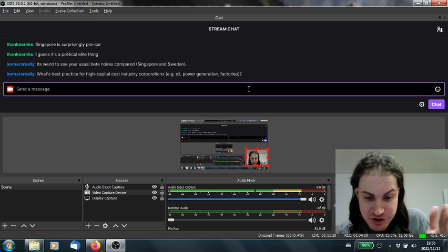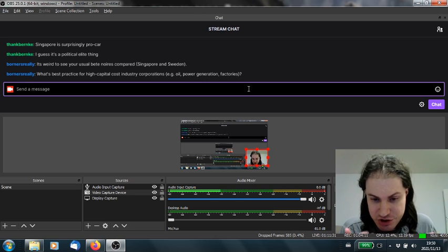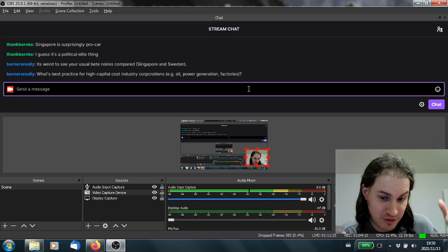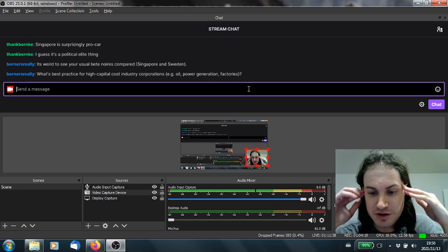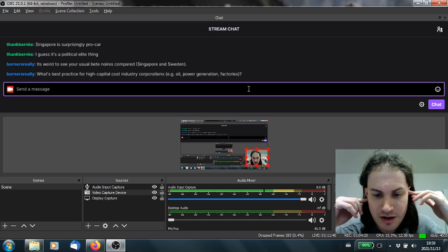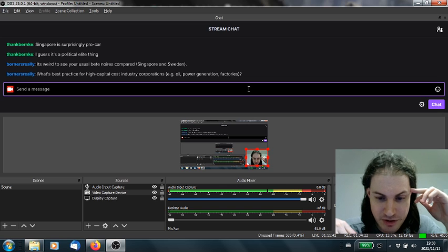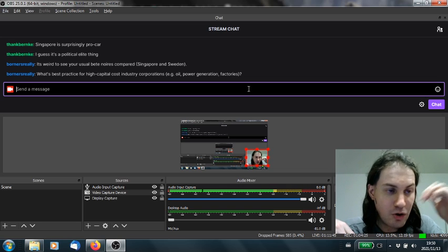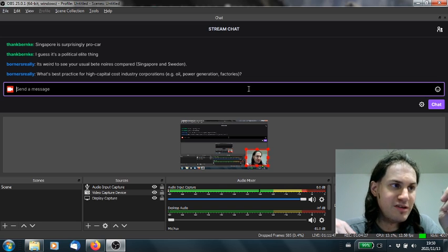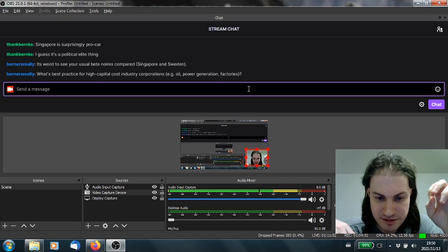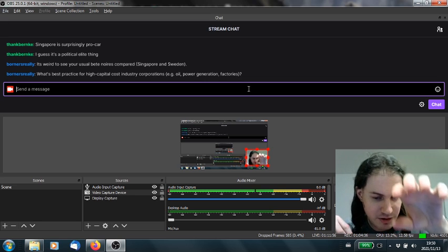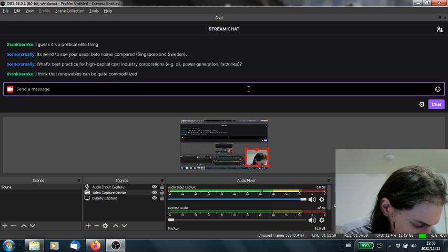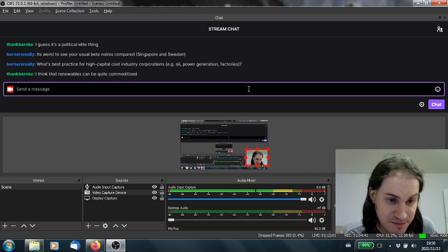Hell, rail and road infrastructure have somewhat different issues. So design build actually works a lot better for small things that are more commoditized, like a parking garage. Like my city thinks that you need more parking downtown, and therefore we're gonna knock down some old three-story department store or something, and replace that with a six-story parking garage. We will contract out the parking garage design build. This is actually something that works pretty well because there's so many parking garages being built. It's basically a commodity.